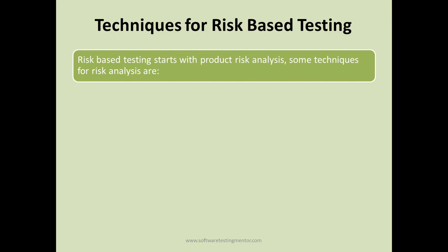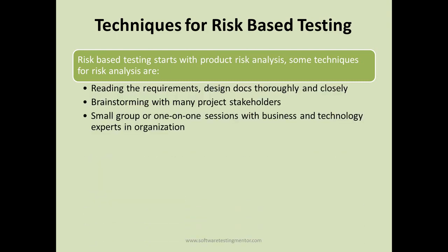Some techniques for risk analysis are: you read the requirements and design documents thoroughly and closely. You read each and every requirement, what the impact of the requirement is, what the priority of the requirement is, and based on the requirement, the priority and the design documents, you prioritize the risks accordingly.